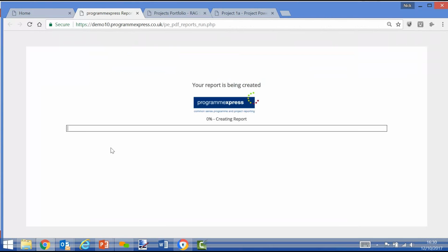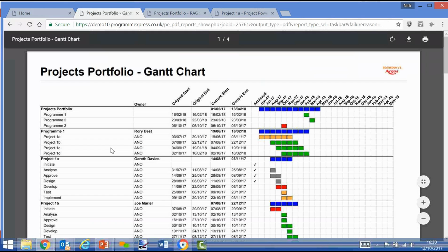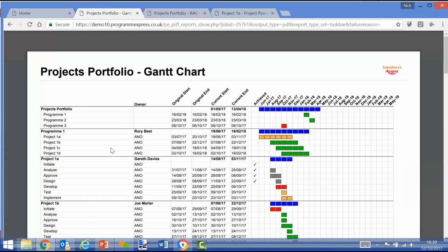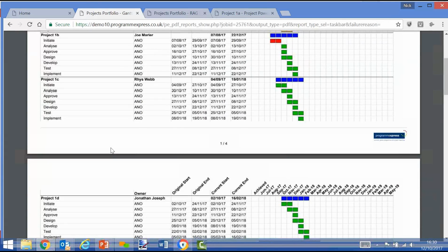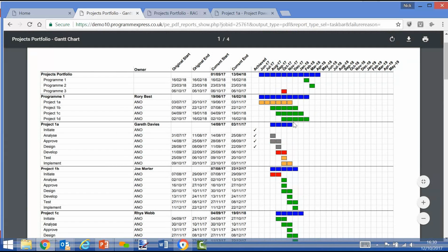That's an example there. And then if we move through to Gantt charts, let's have a look at the plan for every project. One click, and we can now have the program and project plans for every single project below the portfolio. So you'll see here for Gantt chart view, we use the red, amber and green theme for our taskbars. Red meaning it's missed today's deadline, amber meaning it's forecast to be later than was planned or than was expected by the steering group or the governance committee.